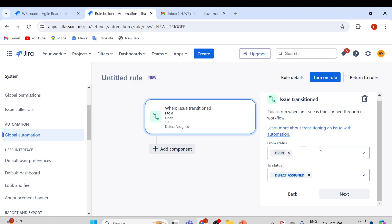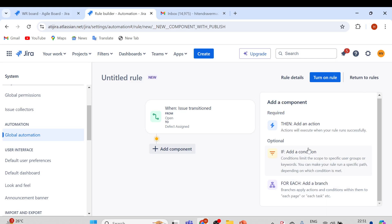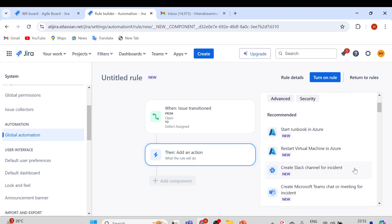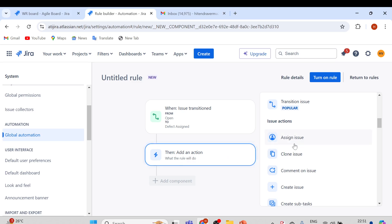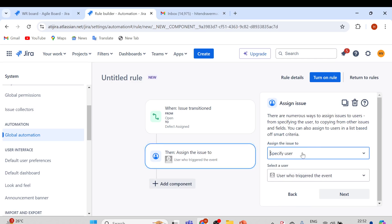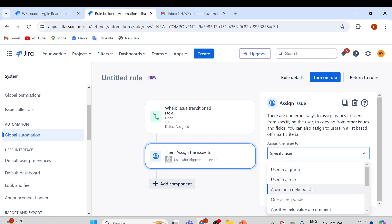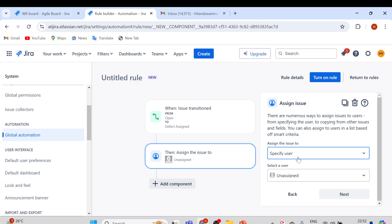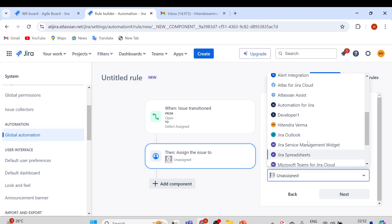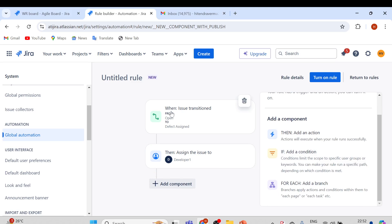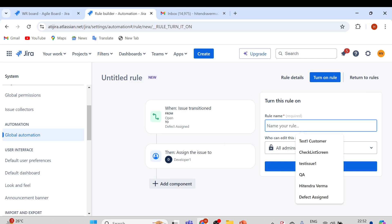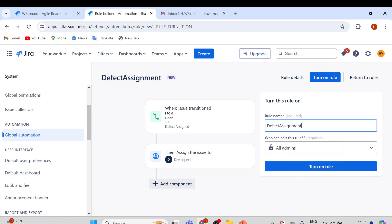To Status: Defect Assign. So when a defect's status changes from Open to Defect Assign, it should be assigned to developers. Click Next and add an action. Select Assign Issue — assign to a specified user. We'll specify a particular user: Developer One, which is the development team lead. Select Developer One and click Next. Now when issue transitions from Open to Defect Assigned, it will assign to Developer One. Click Turn On Rule and name it 'Defect Assignment Rule', then click Turn On Rule.